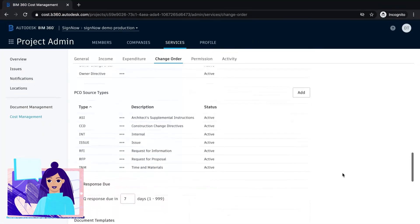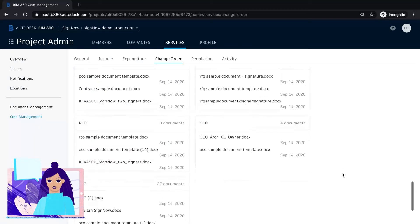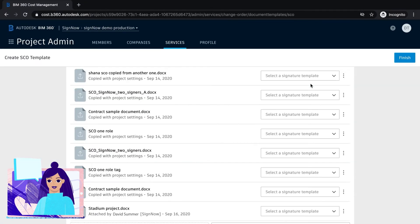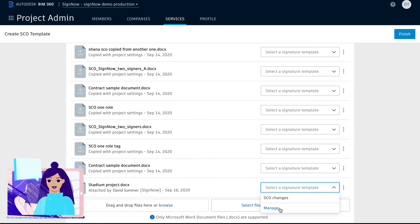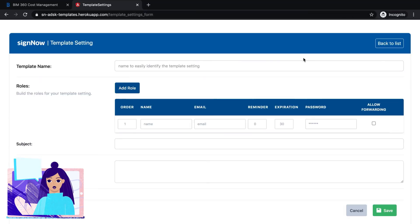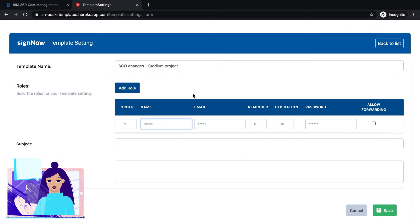Next, we'll need to customize the change order template for all recipients. Start by creating roles and assign them to each signer. Then, set up signing reminders, expiration date, and password protect your document.